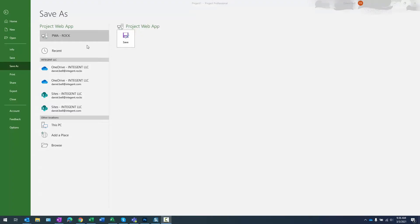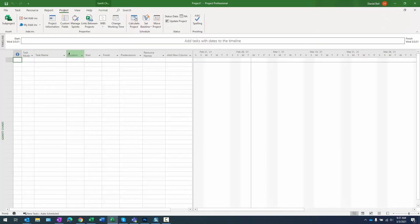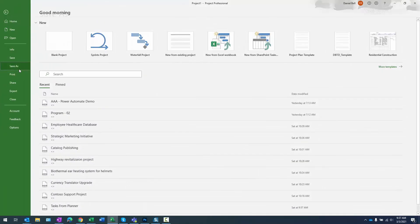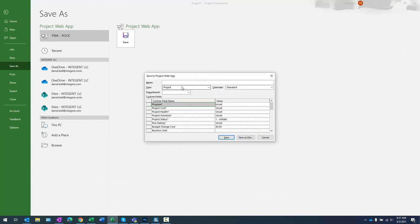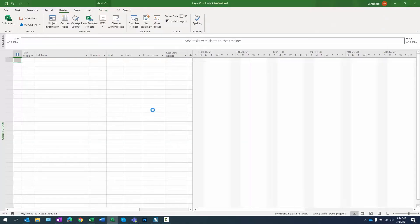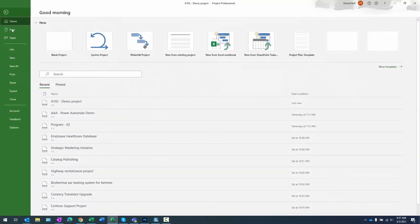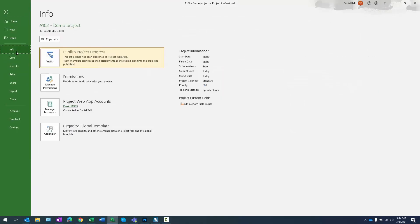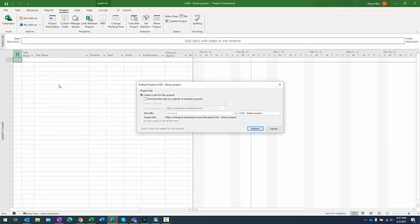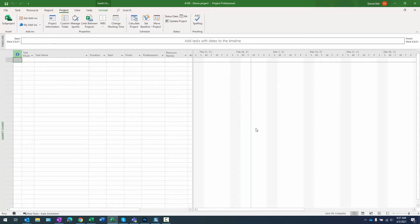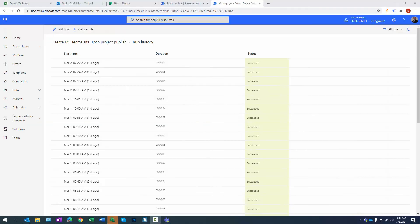So I'm now in Microsoft project, and what I have here is just basically a blank Gantt chart. What I'm going to do is I'm just going to save this project and we'll just give it a name as A102 Demo Project. I'm not really concerned about any of my outline codes right now, just want to save this and publish this. Now we'll navigate file, info, publish project progress. This is going to initiate that flow that creates a team with the name of this project, and the name of that team is going to be A102-demo space project. We'll go ahead and let this process and we'll go ahead and check if that team exists.